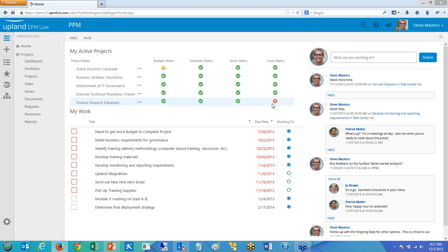Some things you should know about live KPIs is that you can make them calculated, so that, for example, if there are more than 5 overdue issues, I want it to show red. If there are between 0 and 5, I want it to show yellow, and if there are less than 0 overdue issues, I want it to be green. You can control those types of things, and it's very easy to change those, and we have documentation on that if you're interested, as well as training classes, etc. But basically, you can control how and when these change to red, green, and yellow.